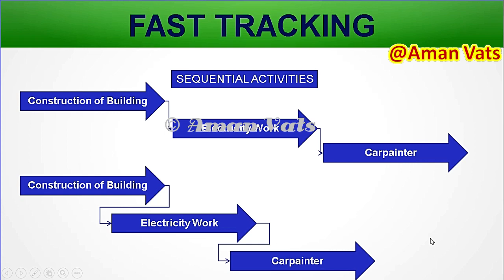This is fast tracking, where you are advancing the activity. You are starting the activity well in advance, before the previous activity is finished. So you can see this is the time you have already saved by using fast tracking.